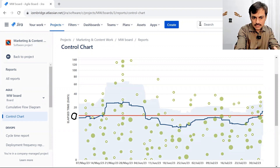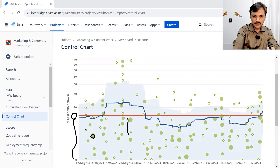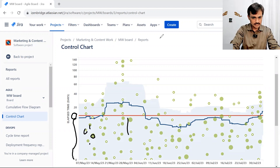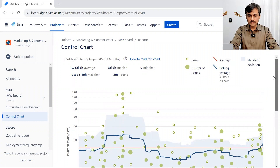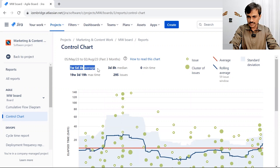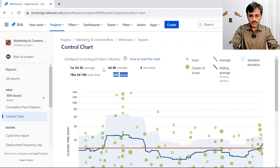Any issue taking less than average will appear below the line — those dots mean items were taking less time than the average elapsed time, which in this case is around 15 days, roughly one week to five days. You can also see what the average is, calculated based on these issues. You also see the number of issues identified and a maximum time out of this data range.